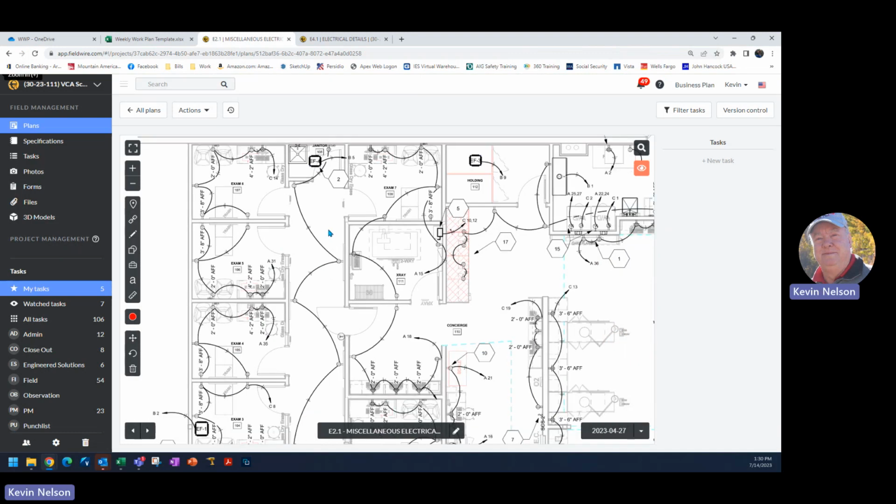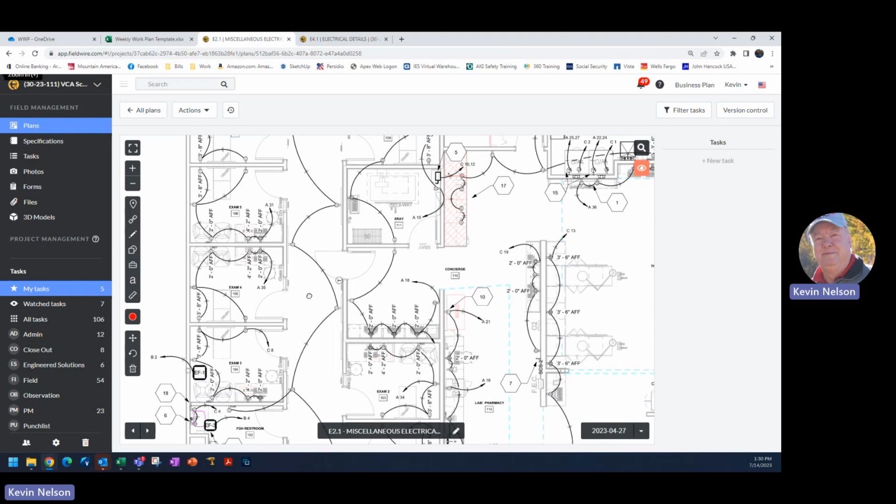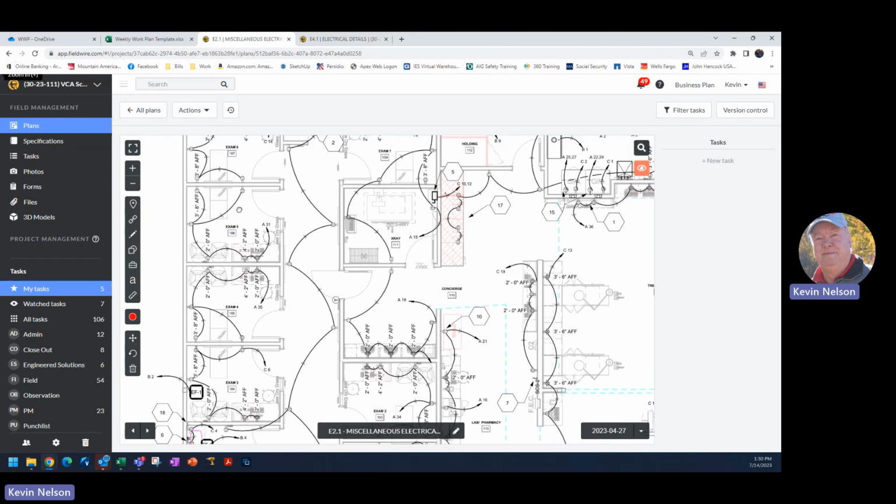In this case, I'll do this because there's no constraints, and by constraints I mean I've got all of the resources, and all the predecessor activities in front of me are done. That's to say that the framing is all complete.